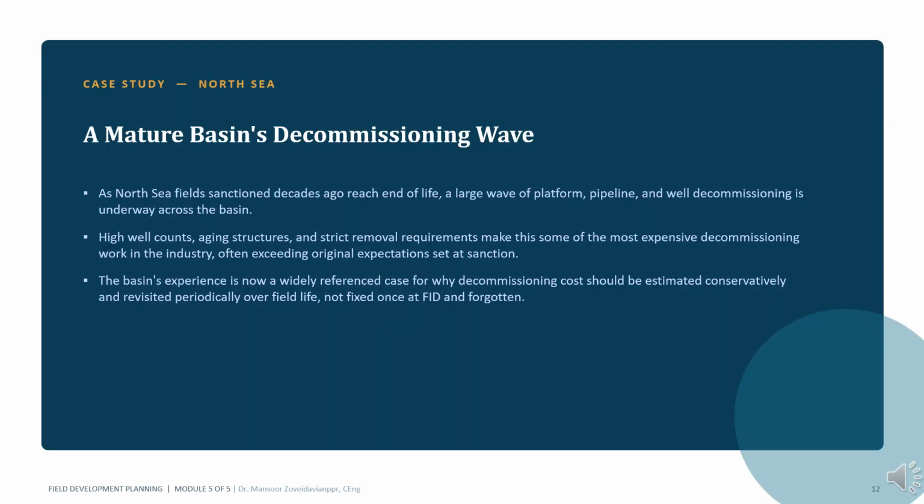The North Sea demonstrates why decommissioning must be considered throughout field life. Many assets developed several decades ago are now approaching abandonment. Operators face large costs associated with well plugging, facility removal, and infrastructure disposal. One important lesson from the basin is that decommissioning estimates often change substantially over time. As a result, responsible operators periodically update their decommissioning forecasts rather than relying on assumptions made decades earlier. The North Sea has become one of the industry's strongest examples of why whole-of-life planning matters.